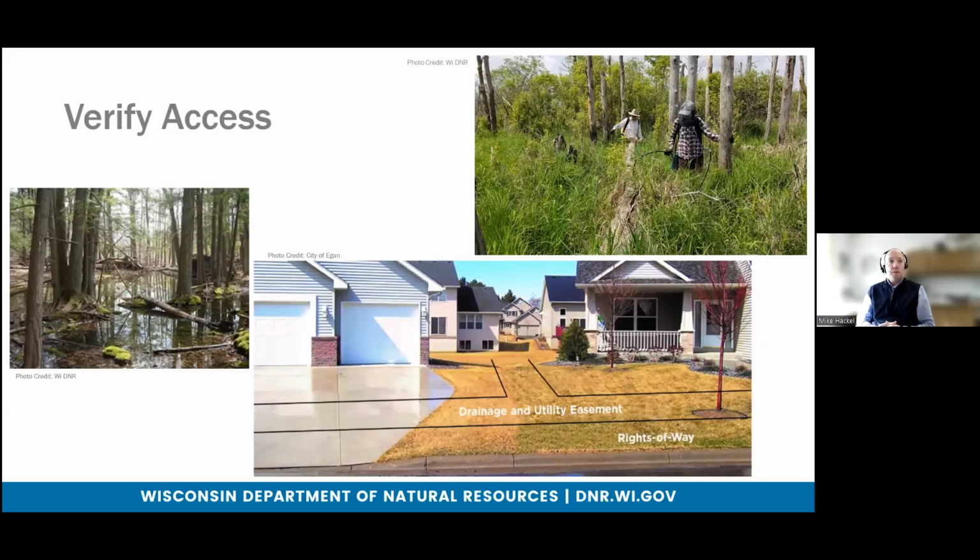One of the steps that go through constructability are verifying access, identifying existing and proposed facilities, reviewing the path, reviewing barriers for monitoring and response. The reason for this step is to try and eliminate the need for changes once the project has started.